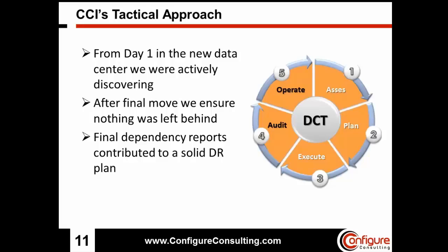So if there was any sort of issue with the performance of an application, we could review the configuration to try and identify any change that may have happened. Even though they're quite slim, it's still quite possible for someone to accidentally deploy it with the wrong size memory or do Windows 2008 rather than 2008 R2. We try our best to mitigate these possibilities, but they still can happen.